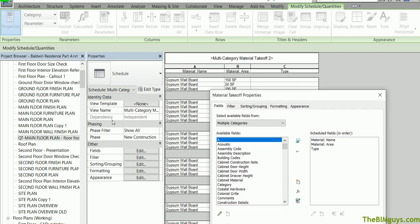And we started off here and you'll see here we have the fields. Now here's some tidbits. If you have multiple buildings, include linked elements. It will also quantify those. So if you're getting weird numbers, you may have this checked and it's pulling other data from other models. So this is a key to keep an eye on when you are quantifying.